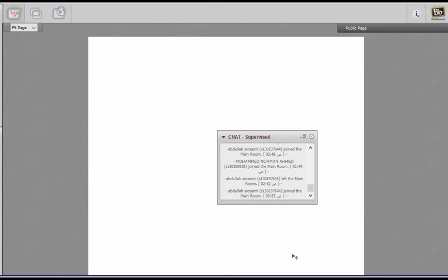Next important question is return on investment. Return on investment formula, as we already know, is total discounted benefits minus total discounted costs, divided by discounted costs. Very simple formula to calculate return on investment. You will be given certain values, for example, what is the current cost, discount rate, current benefit.